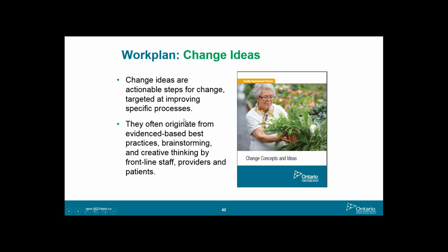Well, if you're going to put those in place, and you're submitting your quality improvement plan for April 1st, and you know it's going to be September before they're actually in place, you would use your comment section to say, we're not actually going to start looking at this until September because it will take this long. Training is planned for the months of July and August because staff are on vacation. We know that will take 2 months before all staff have been trained on this particular assistive device.